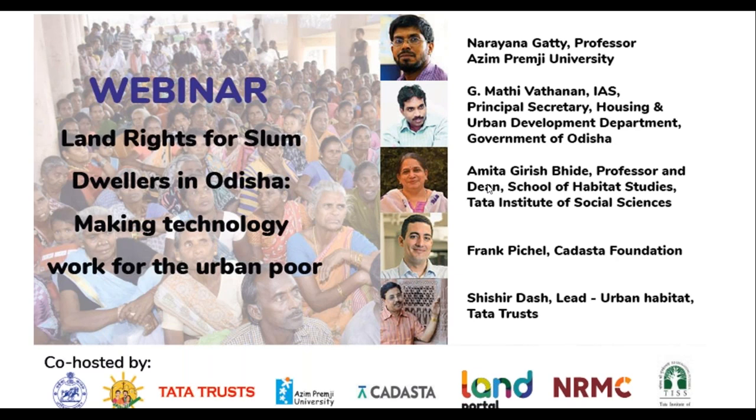In the implementation process, along with the community, to handle the community, we engaged the NGOs, the community-based organizations, to help us in mobilizing the community and doing the house-to-house survey, and anchoring the entire process at the community level, and to help the community in documenting the whole process, and prepare the proposal which can be placed before the final committee for approval. So that is at the community level.